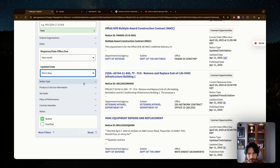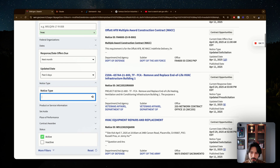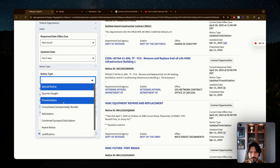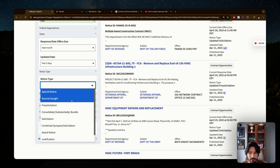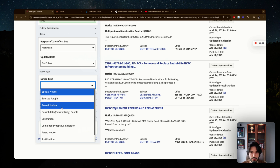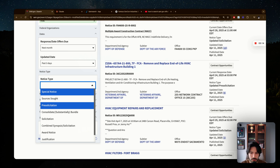The next filter is notice type, which can be confusing. A sources sought notice means the government is doing market research — asking who can do this. It's the earliest stage of procurement. A pre-solicitation means the government is planning to release a solicitation soon, so you can get a head start now. Note that sources sought doesn't guarantee it will become a solicitation.